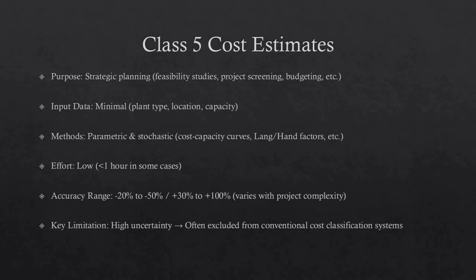Class 5 estimates are generally prepared based on very limited information and subsequently have wide accuracy ranges. Some companies and organizations have elected to determine that due to the inherent inaccuracies, such estimates cannot be classified in a conventional and systemic manner. Class 5 estimates may be prepared within a very limited amount of time, sometimes requiring less than an hour. Often, little more than proposed plant type, location, and capacity are known. They are prepared for purposes such as market studies, assessment of initial viability, evaluation of alternate schemes, project screening, project location studies, evaluation of resource needs and budgeting, and long-range capital planning.